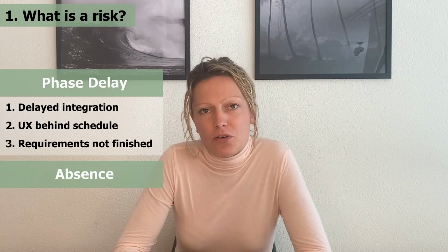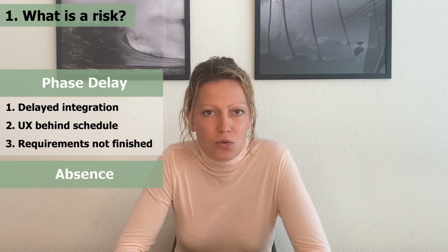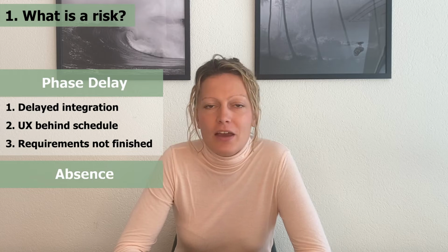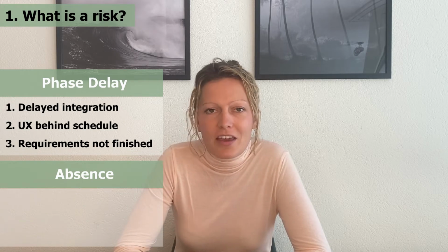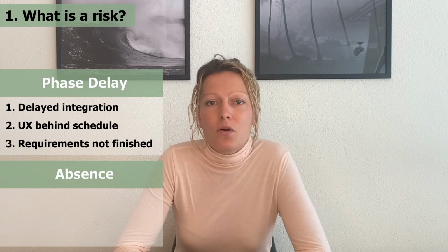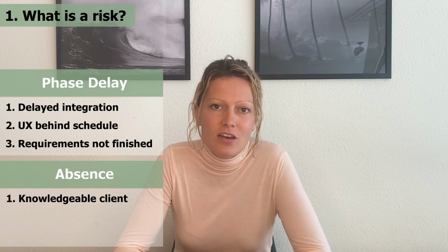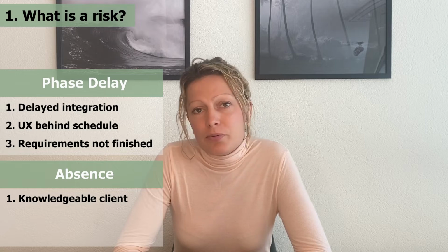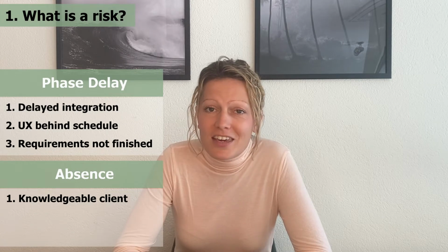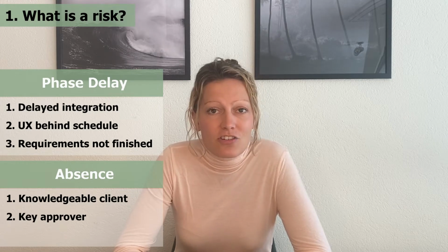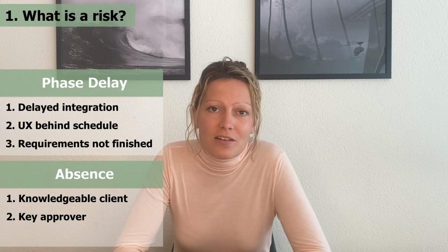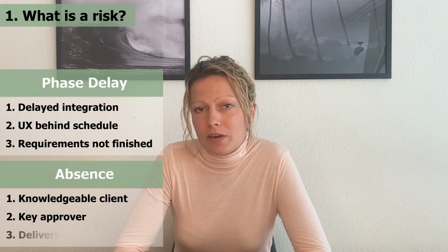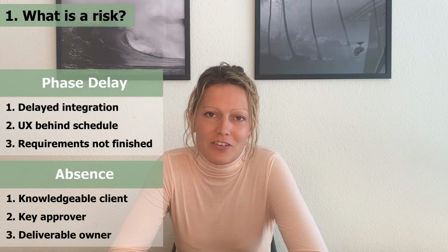Multiple people need to be involved in a project so that the project team has all the right skill sets and experience and all the right stakeholders. If a client stakeholder is unavailable and they are the only designated stakeholder with the required knowledge to complete requirements, then we have a risk. Or if an approver is unavailable at the time that a key decision needs to be made, then that decision is at risk. Or if someone on your team is long-term sick, then there is a risk that their work will not be completed. The third group is human error.